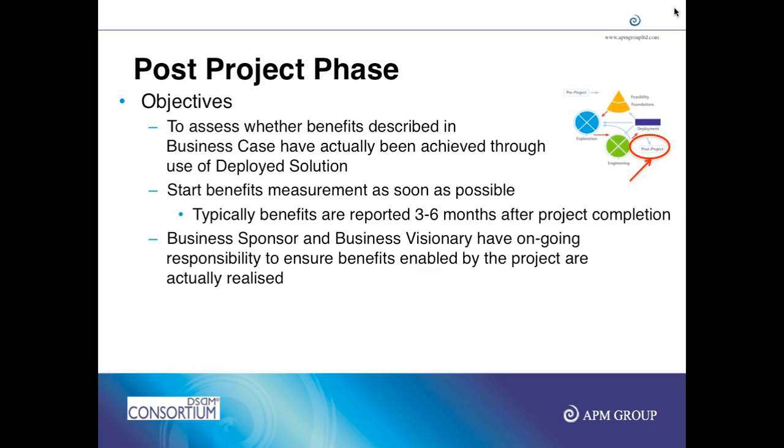This is usually done by the sponsor and the visionary. The sponsor, because he paid for the project and wanted to ensure value for money. So now it's time for him to see what the sponsor has received and what the organization has achieved by doing the project. Whereas the visionary's job is to find out whether the problem was solved and whether the visionary's team enabled that outcome for the organization. If intended benefits have not come, then we have a good lesson learned in selecting projects.